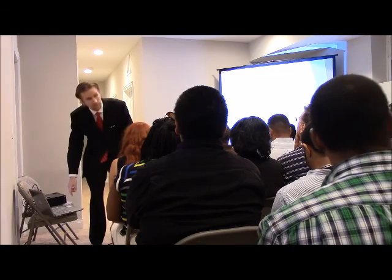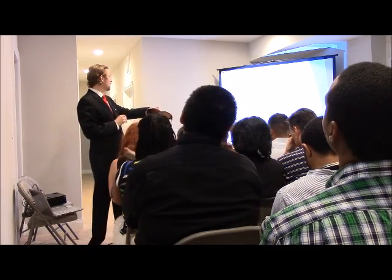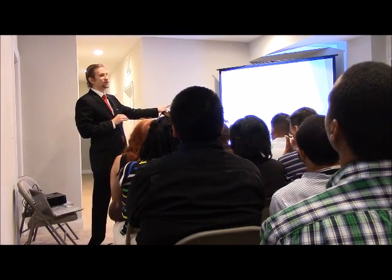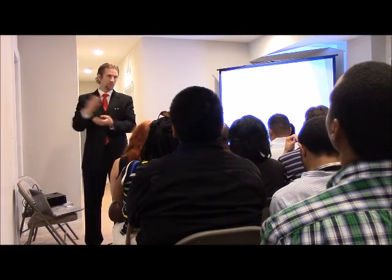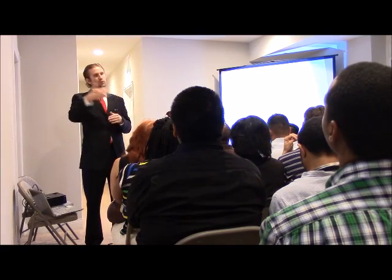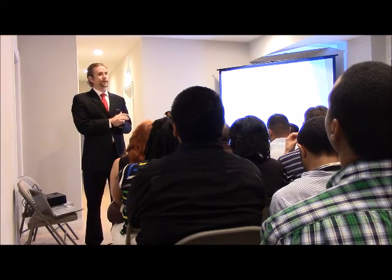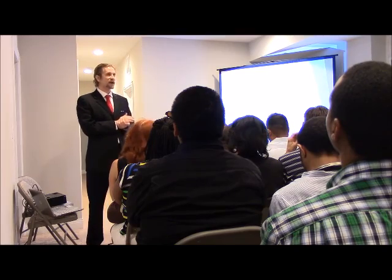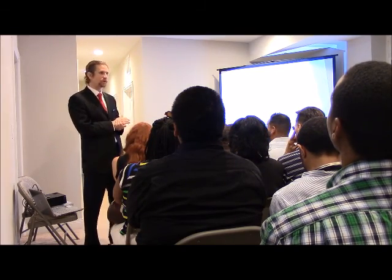For every inspection, yes. And that's why I have in here, I changed it to rough HVAC inspection. That's separate from the work; he does the work and then the inspection happens, obviously after the work is done. But we're letting him know, hey, on March 31st we're having the HVAC inspected, so you need to have the rough HVAC done before the 31st.